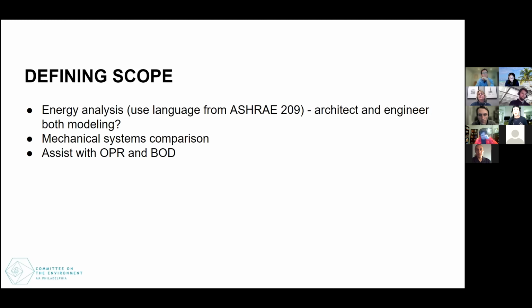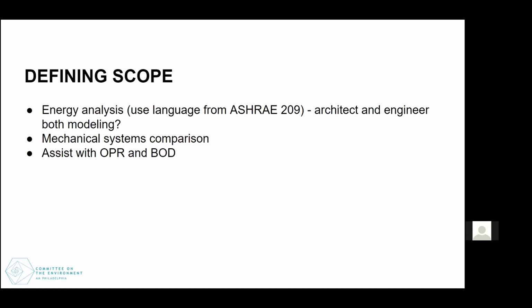Generally, we find that it's better for Lake Plato to lead the analysis in the early design phases when we're largely studying architectural decisions and impacts such as massing, orientation, and envelope assemblies. And it's better for the consultants to take over when systems decisions are being made because the engineering consultant is going to have much better familiarity with those specifics.